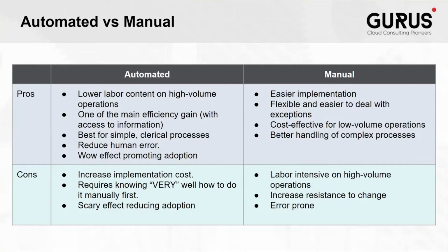However, the core system will likely automate many manual tasks on day one, meaning that aiming for maximum automation by deciding to plan for every single use case that the system could automate will greatly increase implementation cost, and your organization will need to conduct a thorough analysis of the current manual processes prior to automating them, which will delay go live and even result in users being less trained on the typical workflow they may use in order to cash or procure to pay, due to the automation taking the reins in their day-to-day.